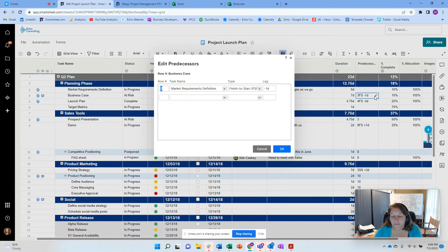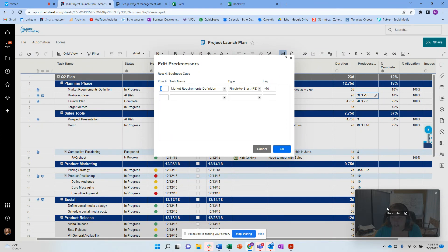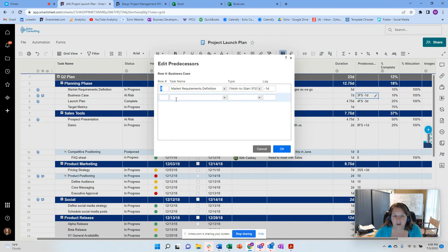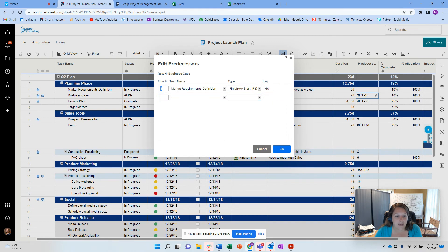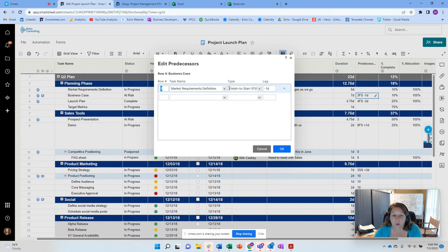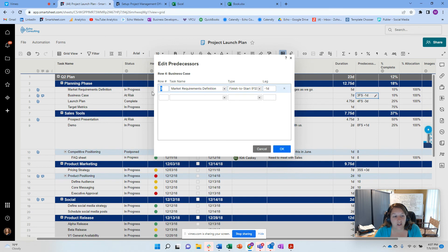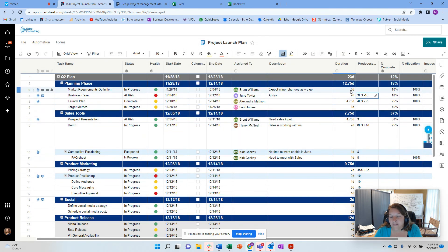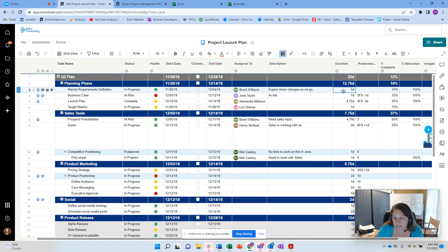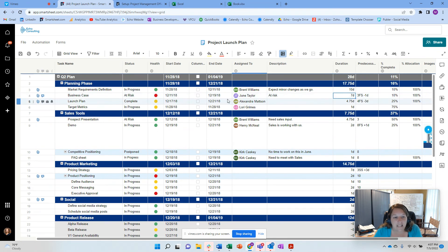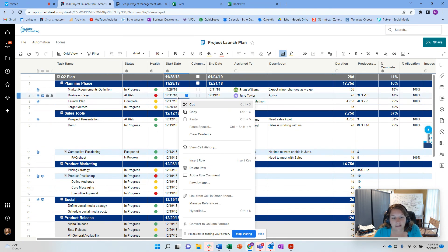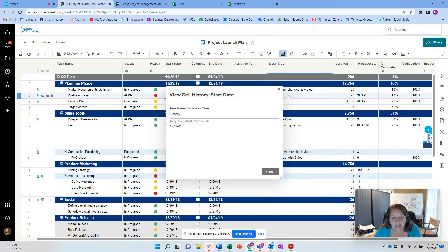I can turn off highlighting if I want to. So the other piece I want to mention that I really like about Smartsheet is the ability to view cell history and see who made the update and when they made the update. So that can be really important. The other piece that I really like is this concept of predecessors. If you're used to, if you've ever seen Microsoft Project, it's a very similar concept. I can make this task business case dependent on a previous task, which is market requirements. I can say that when market finishes, then after that, it's going to have the business case start minus a day. And what's really cool about that is if I change this date to say, instead of five days, it's going to take 10 days. My date here is going to automatically update. Does that make sense?